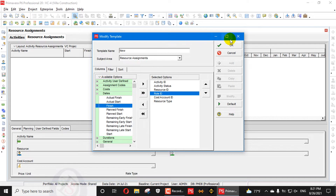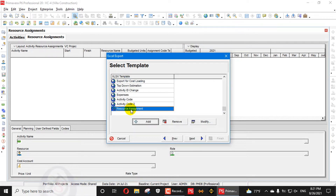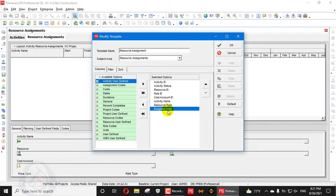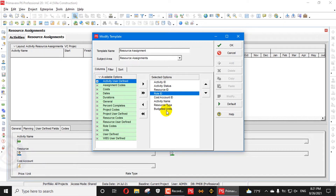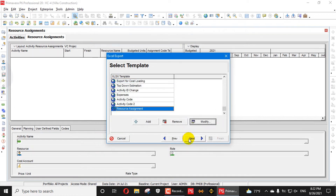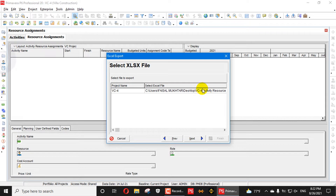I will go here and modify the template — you can see I have already added Budgeted Units. The main columns you need are Activity ID, Role ID (or Resource ID), and Budgeted Units. These three are the main required columns; the others are default and will be included automatically. Press OK, then Next.